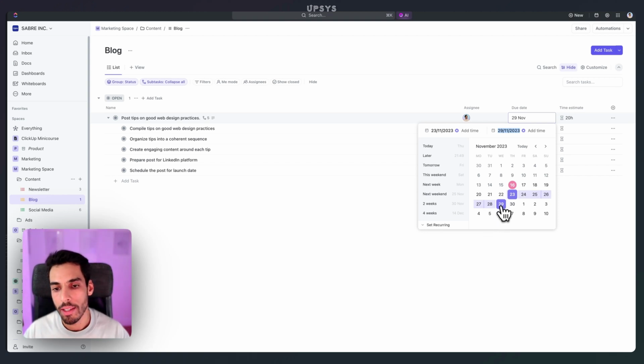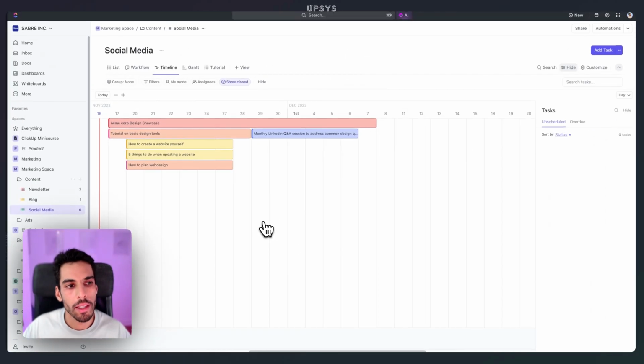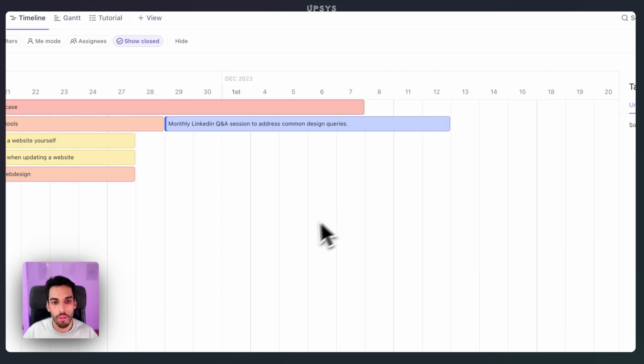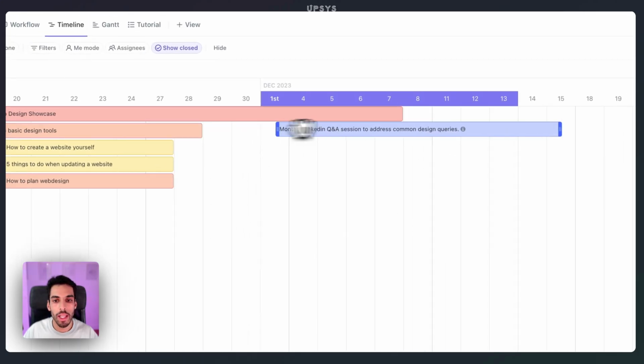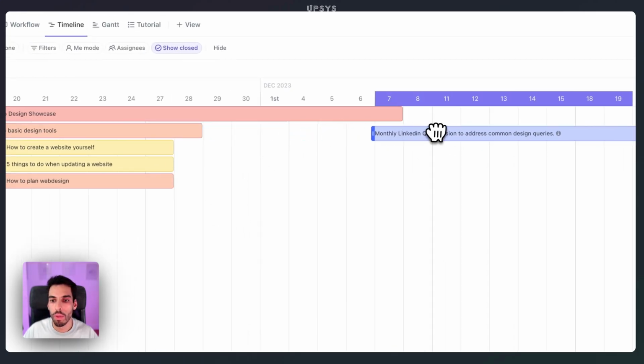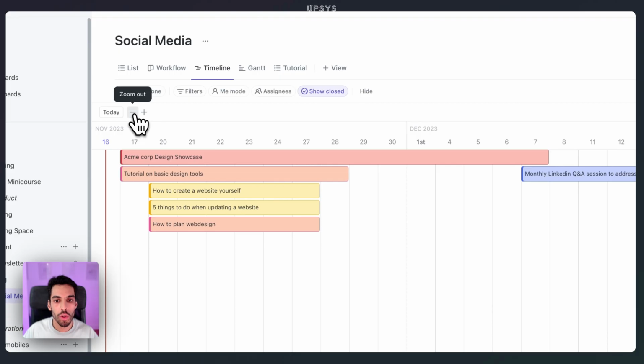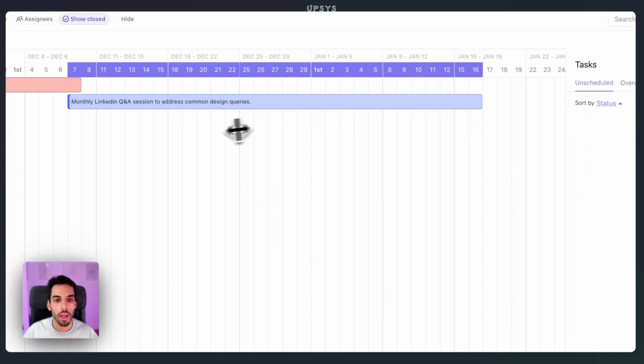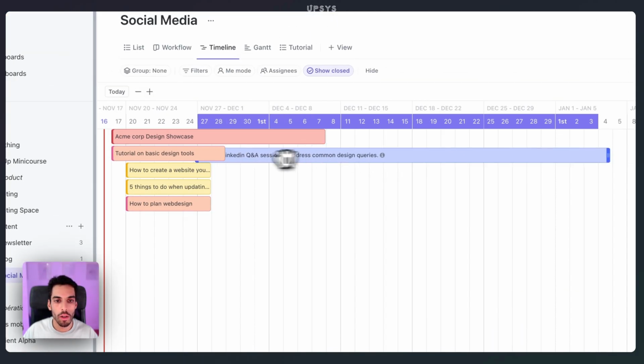When you plan a task, you could decide to define a start and end date, but you could also decide to make a task recurring. And that's a great way to standardize a process. The best view to plan a task is the timeline view. The timeline view will allow you to define start and end dates very easily by dragging and dropping the left and right side of a task. And you can also slide in a task if you know it's going to be pushed to later, and zoom out to be able to even push it to further and move the tasks on a larger timeline.